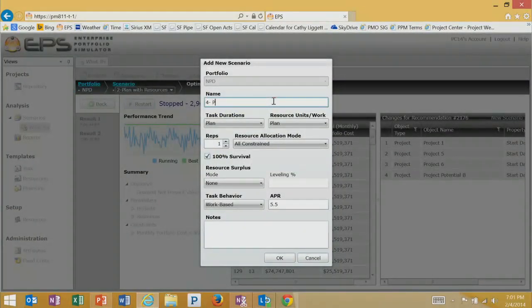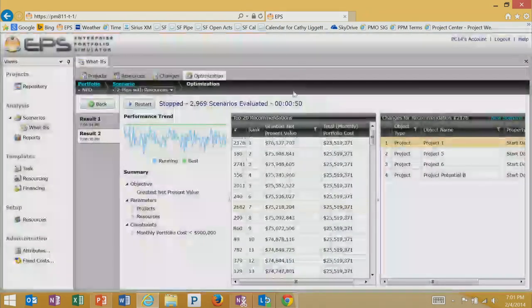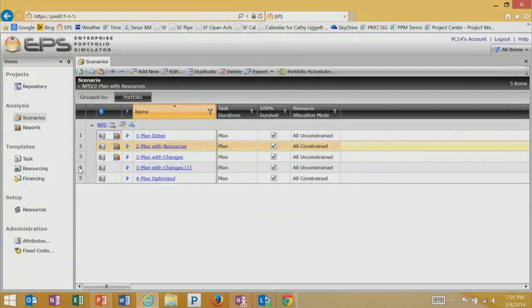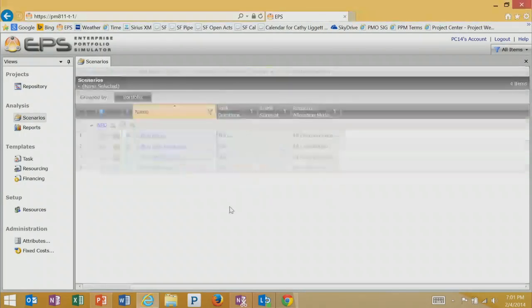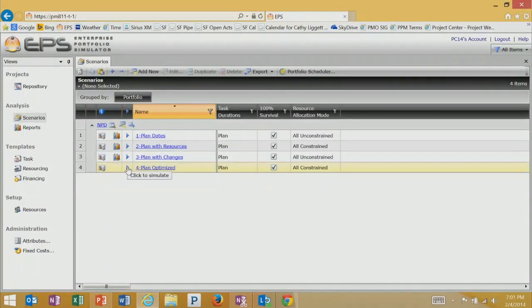Exactly. So, we can either import them with named resources or pool them into their skill sets. Because typically you want to look at my current in-flight projects against future proposed projects, and those future proposed projects are almost always at the skill set level. No one's assigning specific named resources to those projects yet. But you still want to be able to compare apples to apples in your capacities. And so, yes, on import, that's an option.